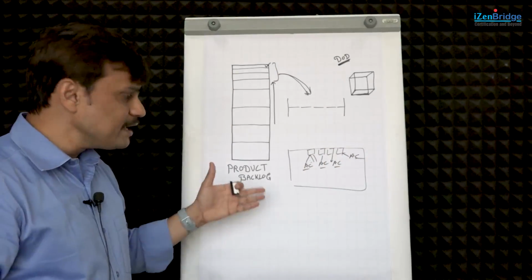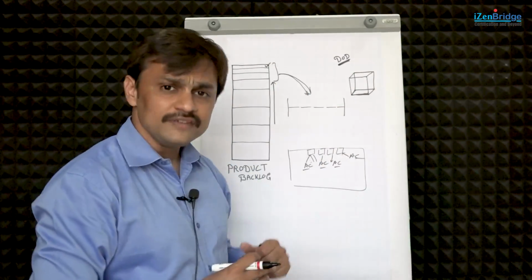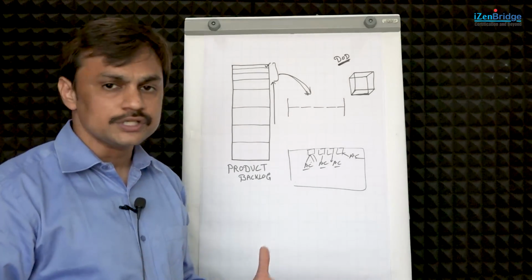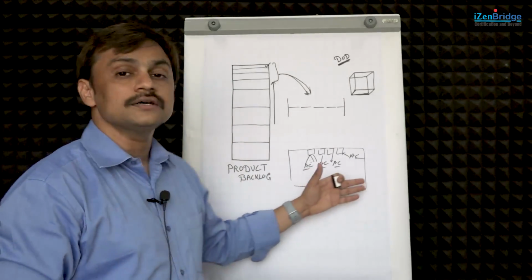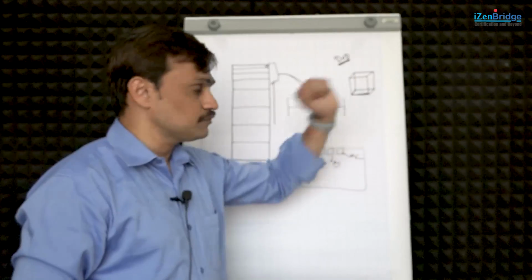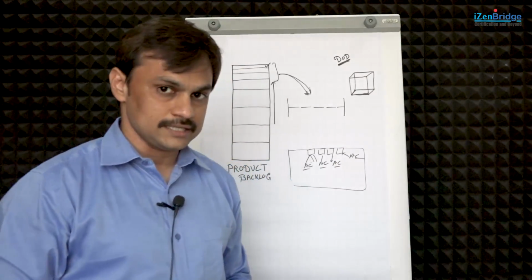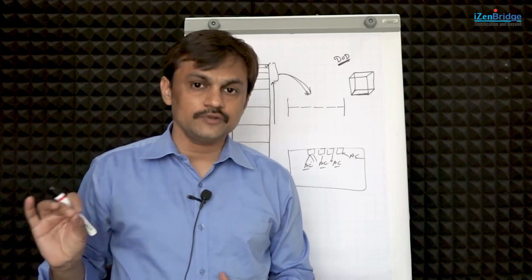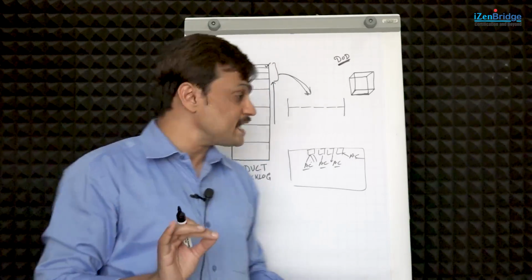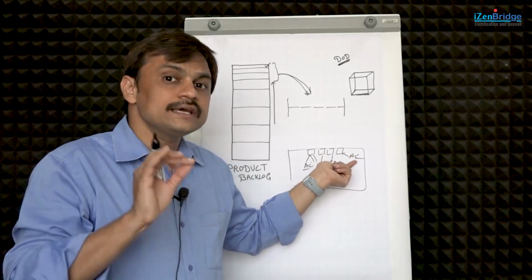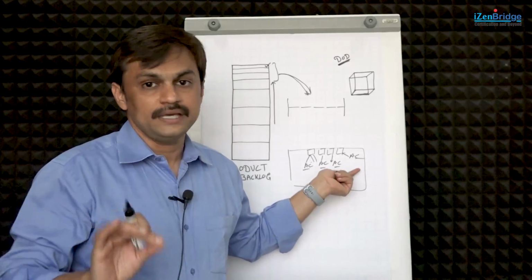Now, somebody will say that when I already have acceptance criteria, why do I need a definition of done? I have items defined here, I had a conversation with the users or the stakeholders, whoever is relevant, we explored them together with the business people as well as the development team, and we refined the acceptance criteria, and that should serve the purpose of identifying completeness. Now, here is the problem. The acceptance criteria come from the business perspective, but there could be technical perspectives, internal perspectives also, which are attached to the completion. What if those perspectives are not taken care of? And can we declare something complete without those things being completed?